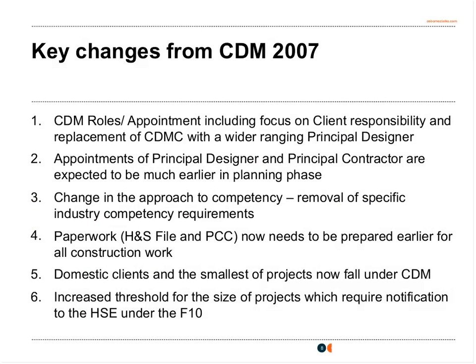There's been a change in the approach to competency, with the removal of some specific requirements. The paperwork requirements have changed. Primarily, they need to be prepared much earlier for construction work. And we did mention domestic clients and the fact that now the smallest of projects will fall under CDM 2015. The threshold for notification to the HSE is one of the things that has actually increased under CDM 2015.